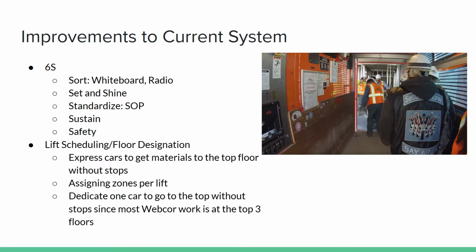And after that, another one of our ideas for improvements to the current system is the idea of lift scheduling or floor designation. So currently, Webcor already has one man lift work as an express car first thing in the morning around 7 to 7:15, and this essentially starts at the ground floor, and everything that's loaded onto it are materials, and those are sent straight to the top floor without stopping.